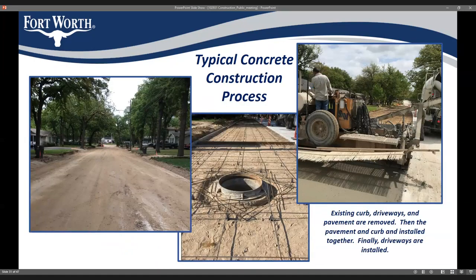For concrete streets, all existing pavement, curbs, and driveways will be excavated first. Then the pavement and curb are installed together — monolithically — so the curb is integrated with the pavement itself. The contractor will most likely do half the street at a time, as shown in the third picture where they're doing one lane. When that is done, they'll come back and install the new driveways.